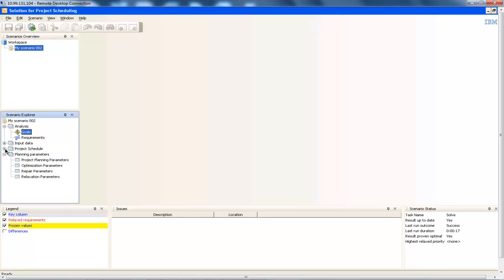ODME can also be used to create multiple scenarios to explore the effects of changes to the goals or the input data, such as seeing the effect of using contractors or seeing the impact of having more or less resources available. The scenarios created can be solved separately and the results can be compared against each other side by side. Here we will show how this is achieved. If you recall from the previous scenario, we did not have a possession manager available to oversee the whole task, so we're going to create a new scenario where we relax the availability calendars and see the impact of this relaxation on the entire solution.